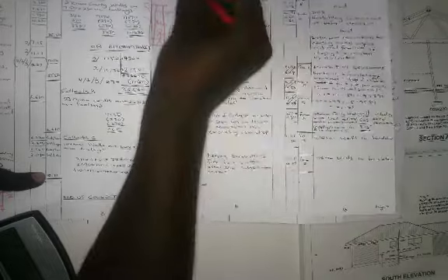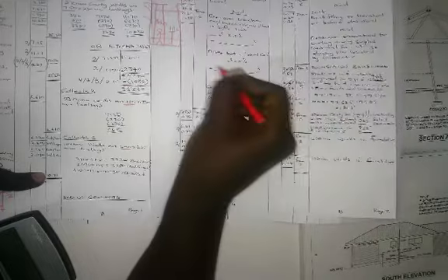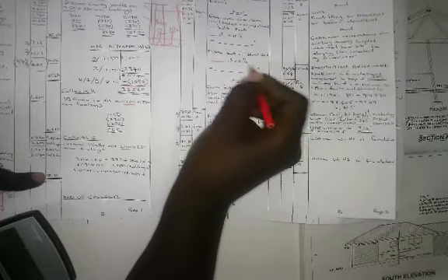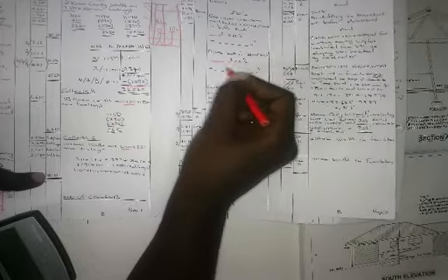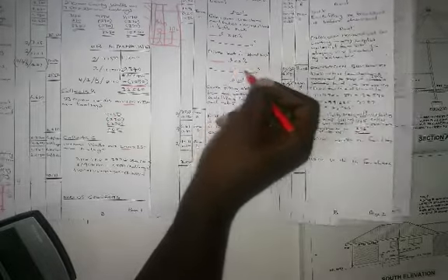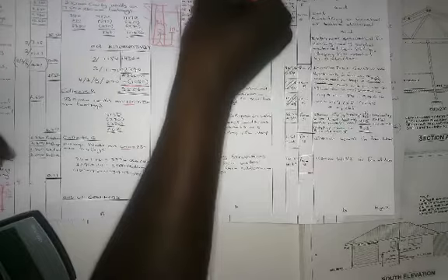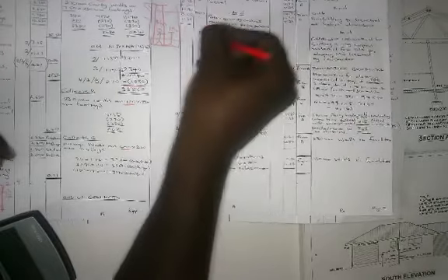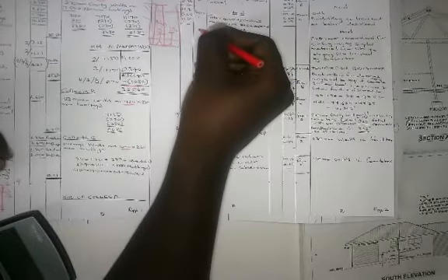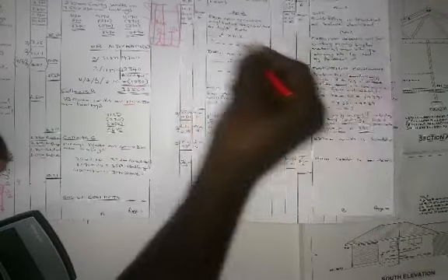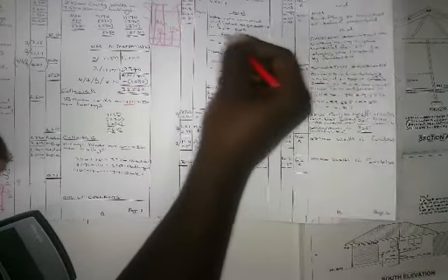The answer you get from A, you need to multiply out with 10% to get the cubic meters of your soft rock. And the answer from A, you need to multiply over here with your hard rock, to get the answer of how much is the percent of your hard rock.